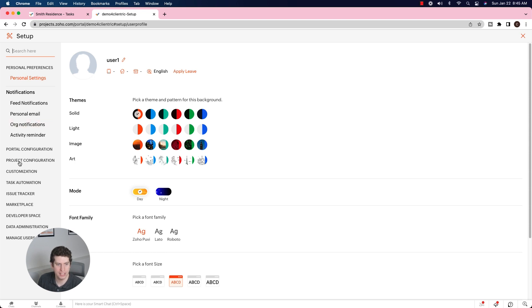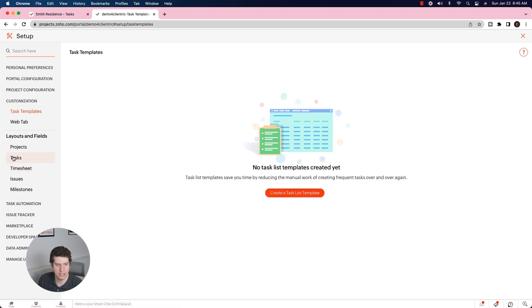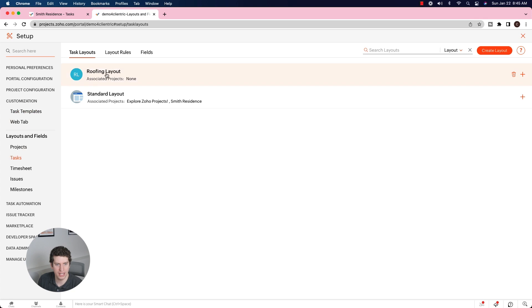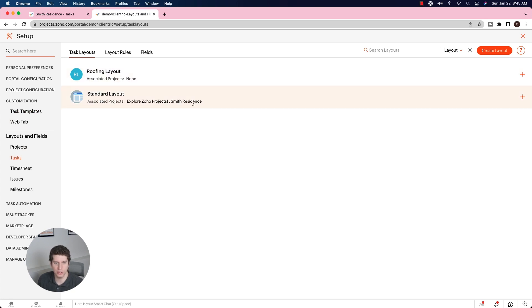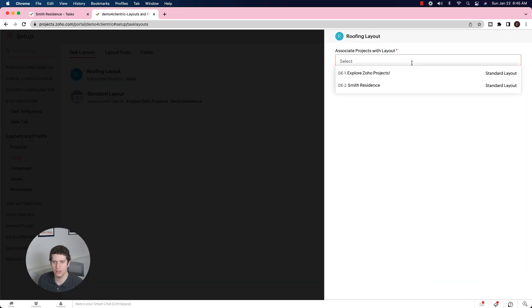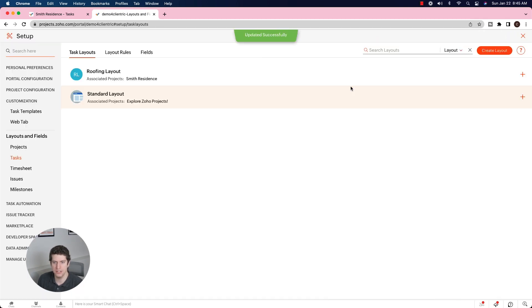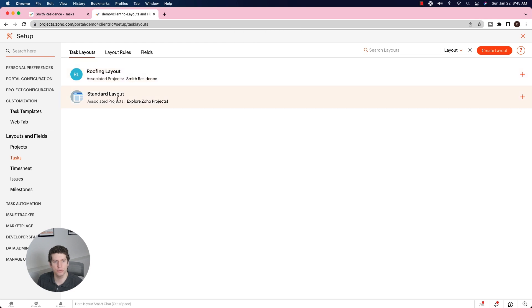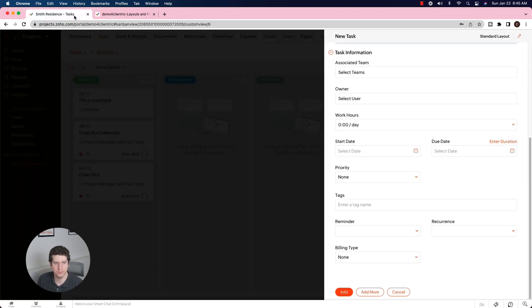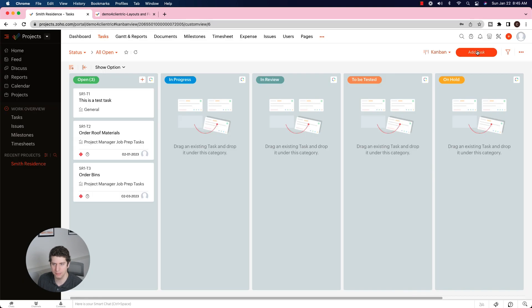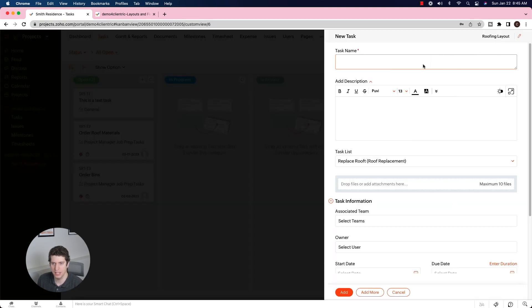What I actually forgot to do was I forgot to reassign the project to that new layout. So if I come back in here, I'm going to go to customization again, go to the tasks. Right now the standard layout is associated with the Smith residence. Well, I'm going to add the Smith residence to the new roofing layout. Now the Smith residence is under this new roofing layout.